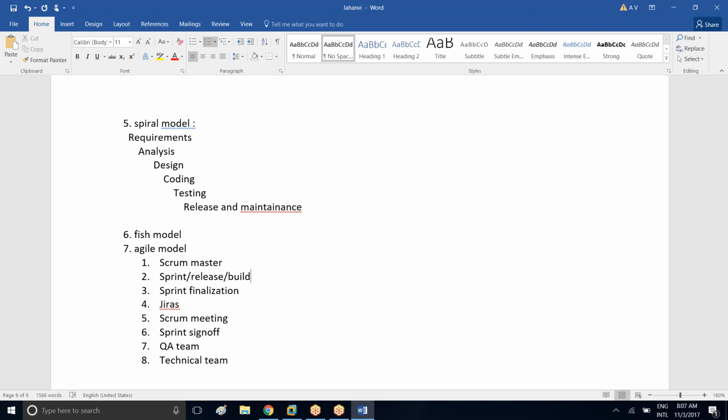Okay, so in a project, let's say the project is for like 3 years. After 3 years, you will not show what you have done to the client. Am I right? That means for every 2 months or 3 months or 5 months, you will show what you have done to the client. So if the client wants to make any changes after looking at whatever you have done, he will go ahead and make the changes immediately. He will not wait until the project is completed. So in real time, they can call it a sprint or release or build. All three mean the same. But it depends on the project, whatever terminologies they use.